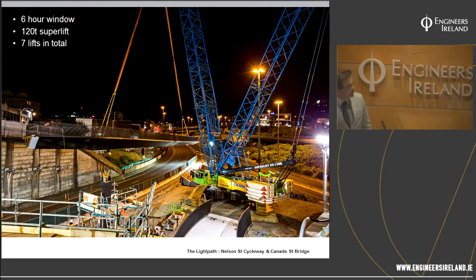So this is it, the night of the lift. We only had a 6-hour window, so the beam was pretty much ready to go as we got the all clear to lift it in. As I was saying, there was a 120 tonne super lift, and in total the bridge was lifted in over 2 months with 7 lifts.